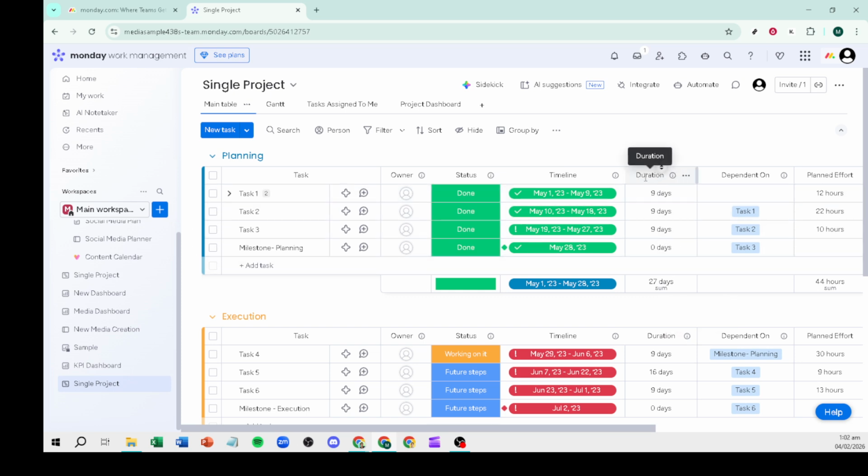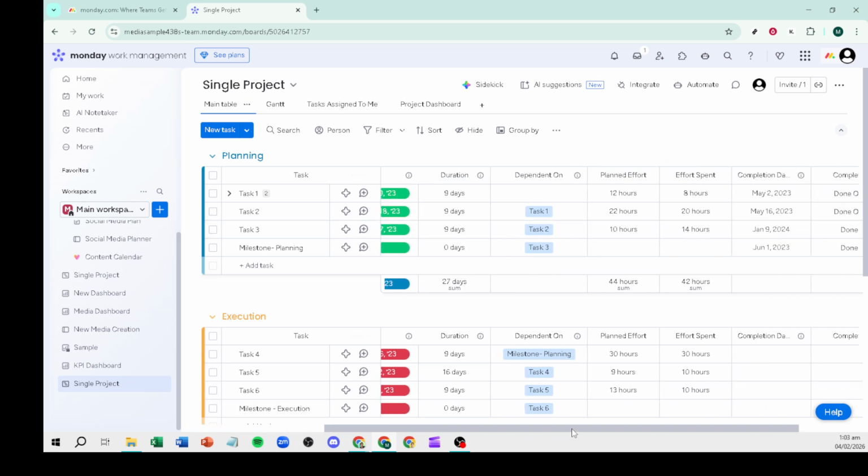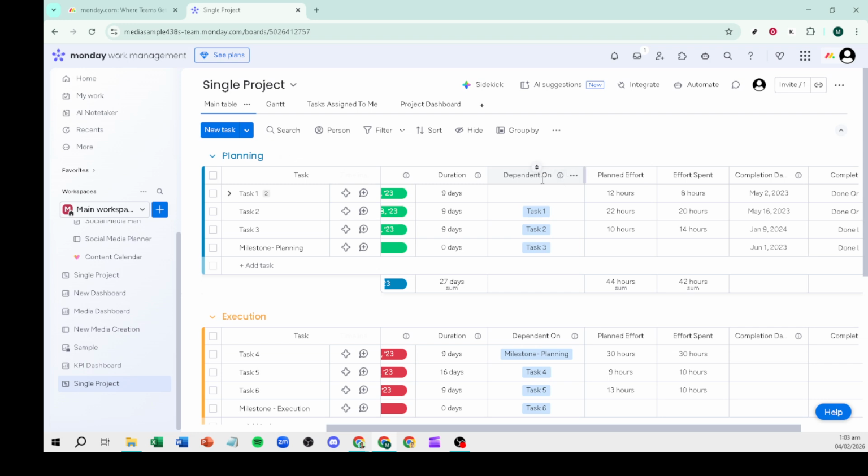To sequence the work, add a dependency column and link tasks that must finish before others can begin. This reduces bottlenecks and automatically highlights when a delay in one area might impact the next. Keep dependencies simple and avoid circular links to maintain a clean, logical flow.